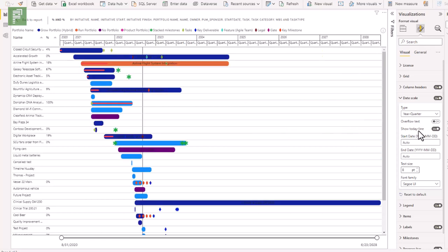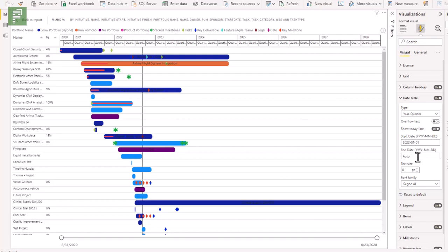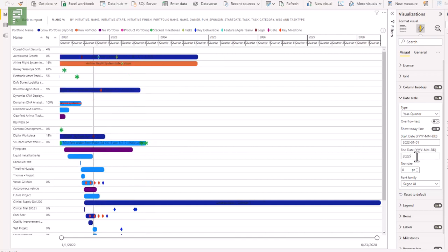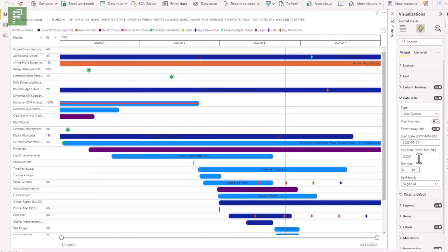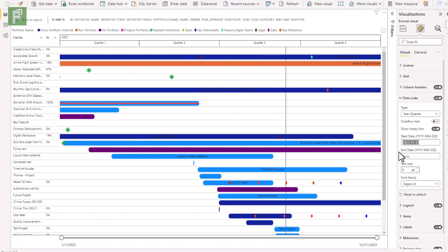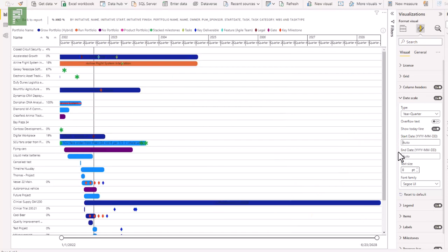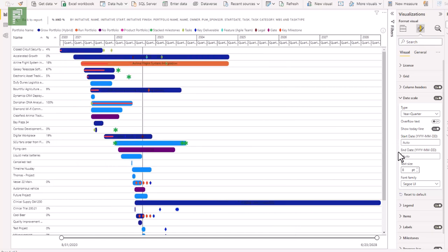Show the today line. Yes, that is always very useful. And then there is an option to change the start date and the end date. Now, this is ideal if you want to focus on a single time frame such as the current year. So we can change this to 2022 starting at the 1st of January all the way till the end of the year. And here we have the full list of activities based on that year. Now, if you remove that value, it turns back to auto and it will populate everything that is in the range of the data set that you have available.